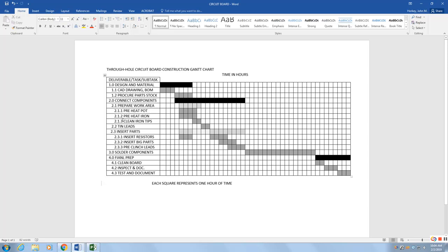We always start with the smallest or the lowest tasks and then combine them up into the above summary tasks as needed. It'll take care of those numbers for us. In other words, we're going to enter these three, summary task those into 2.1, summary the whole thing into 2.0.